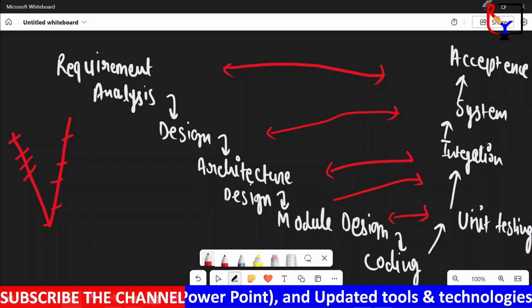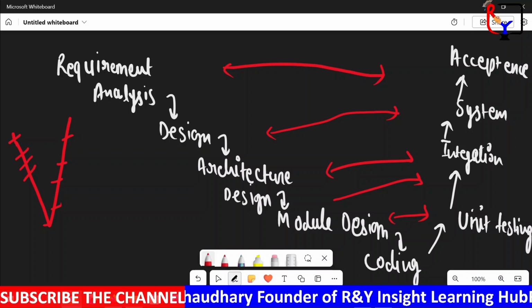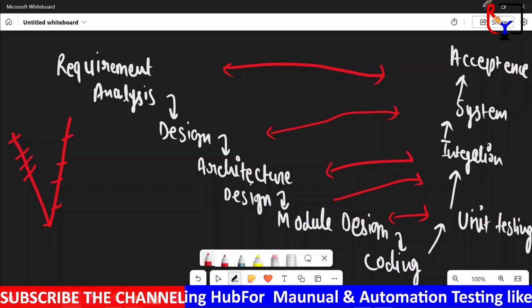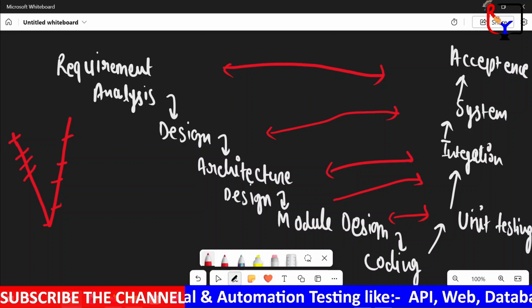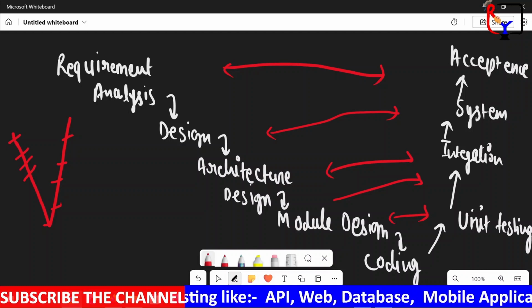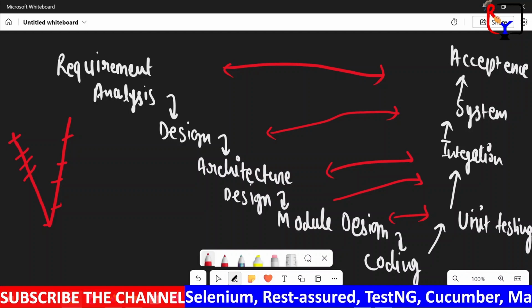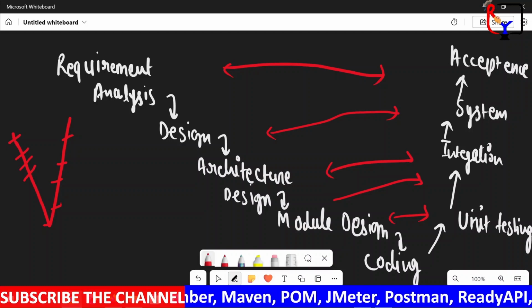Okay. Each development stage has corresponding testing activities. This allows the team to detect errors in requirement specification, code, and architecture early in the development of the project. Unfortunately, fixing errors is still difficult and expensive as there is no clear path for resolving the problem. The addition of early test planning gives the V model a greater chance of success than that of the waterfall model.